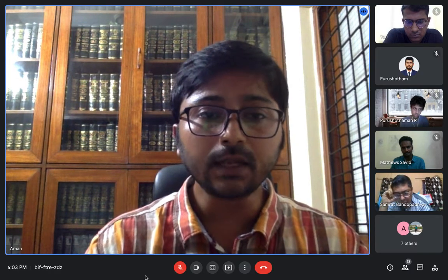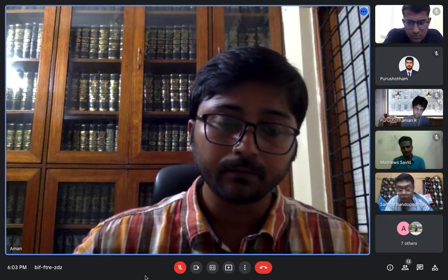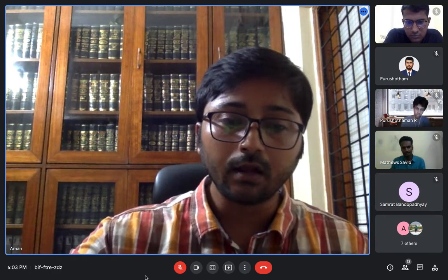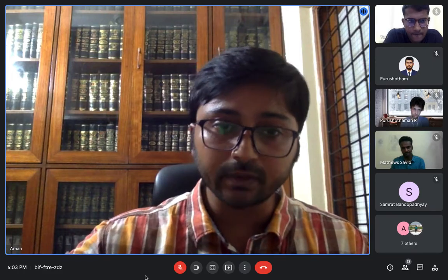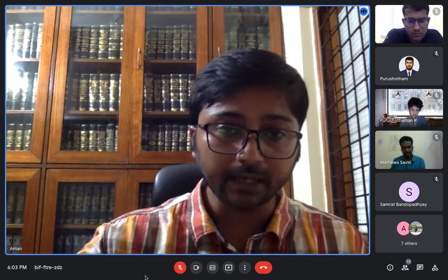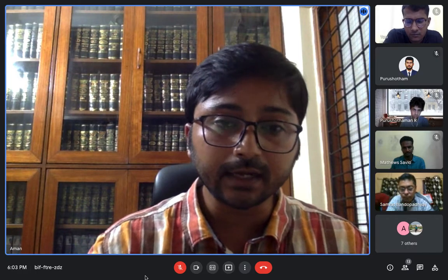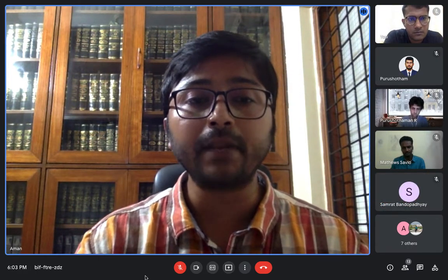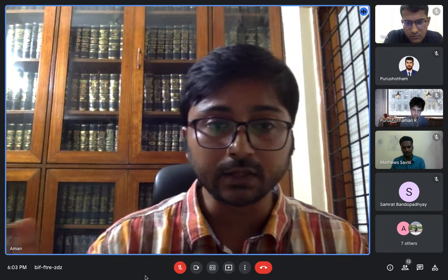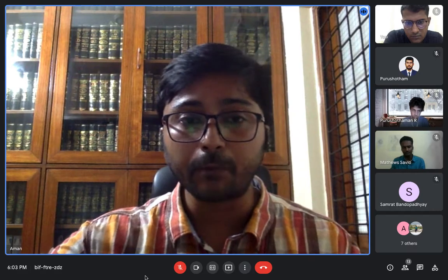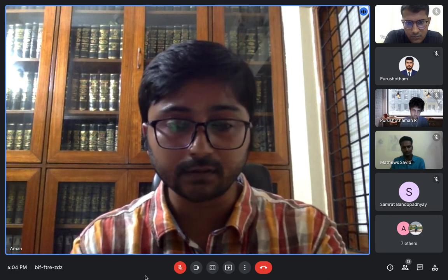In institutional arbitration, if I take the example of MCIA, the Mumbai Centre for International Arbitration, they have panel members listed beforehand. If the clause mentions that MCIA arbitration rules will be applicable for dispute resolution, I have to choose a member from that panel list. I give a name, the other party gives a name, and based on that the presiding arbitrator is chosen. In ad hoc, I have the freedom to nominate any person, be it a retired judge or a technical person such as an engineer. But in institutional, I have to appoint from the panel list only, which contains retired judges and retired engineers.